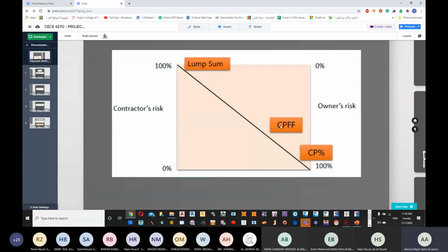There will not be a loss. When it comes to lump sum, he has chances of losing as well. Okay, we signed an agreement for 20,000. If the actual value turns up to be 22,000, then he needs to pay the 2,000 from his own pocket. Okay, are we clear?